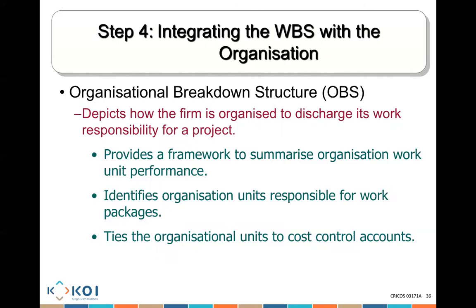Now, this person works for this department, and this person who works for that department is working on this job, so that job will need to be billed to that specific work center in the organization to ensure we make a proper report about the costing of the work that we're doing in our business.